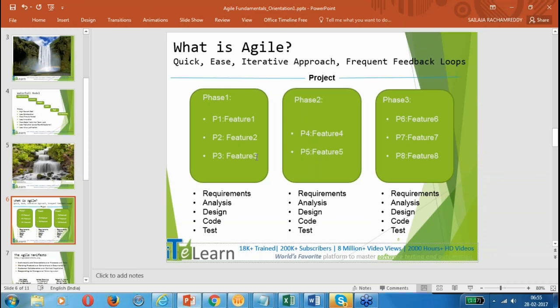If I'm developing a website, my login page should be first. And then the list of products I have, and then the shopping cart and the billing. So these 3 things are important for me, where I can get the value from phase 1. And yes, sorting and the other beautification can wait for the further phases. But the first top things which will get me the money, which will get me the value, will come in phase 1.